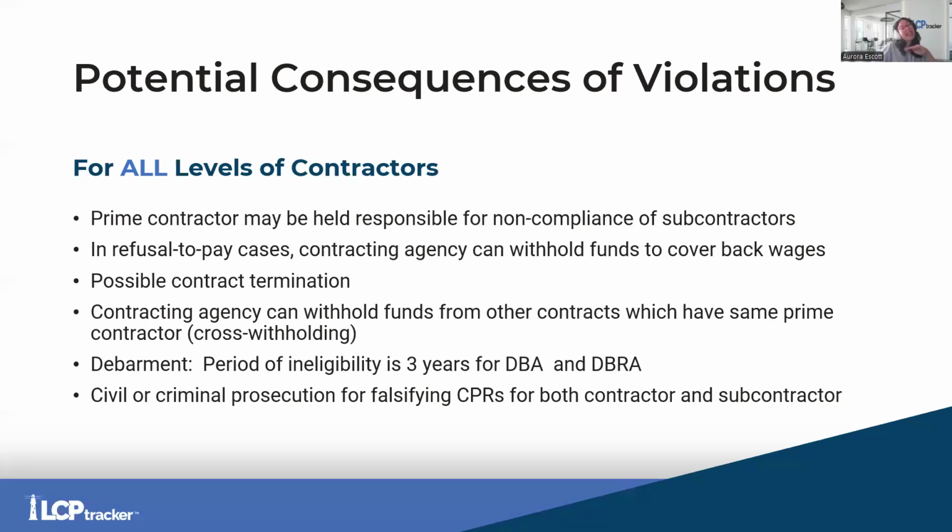Why? Because at all levels of contractors, we've got some major potential consequences. For my primes, you may be held responsible for the non-compliance of subcontractors at any tier level. So you have to be on your game when you're looking at the certified payroll reports and any backup documentation that you're collecting. In refusal to pay cases, contracting agencies can withhold funds to cover restitution. That's not fun. You could face possible contract termination. There could be cross withholding.